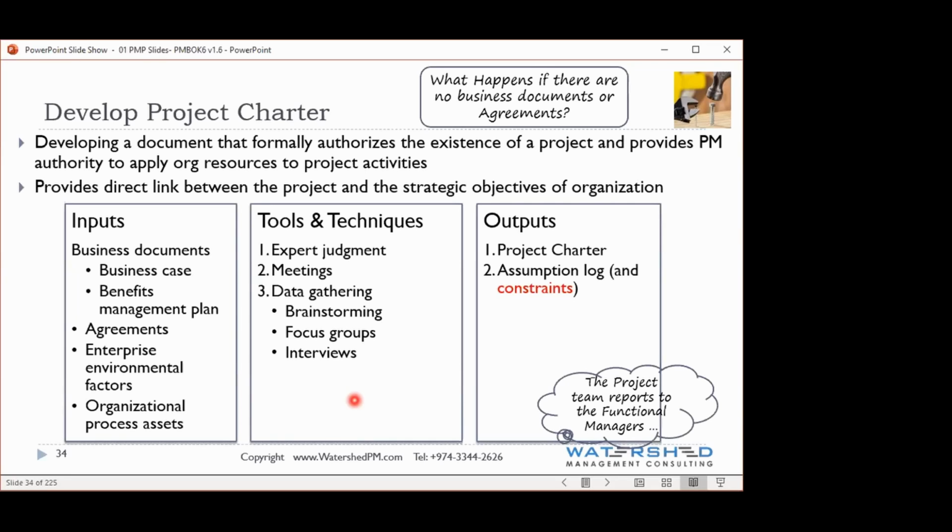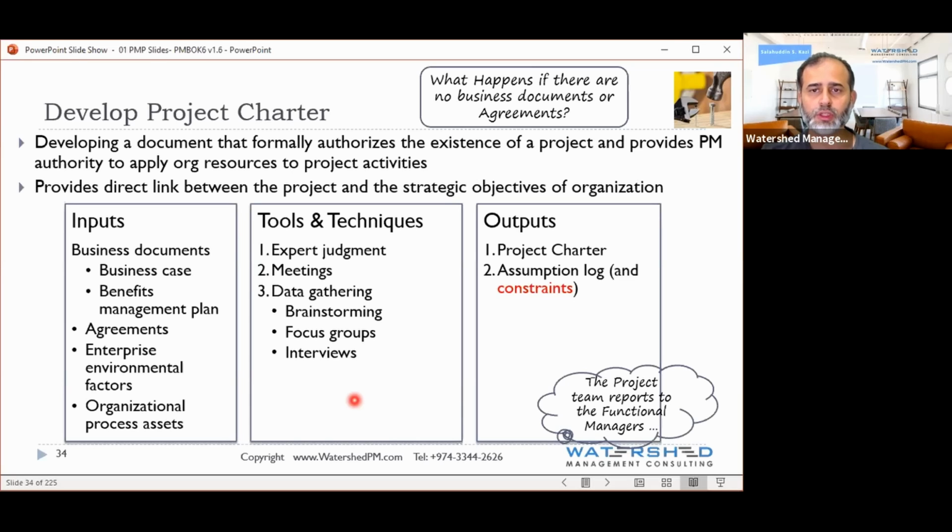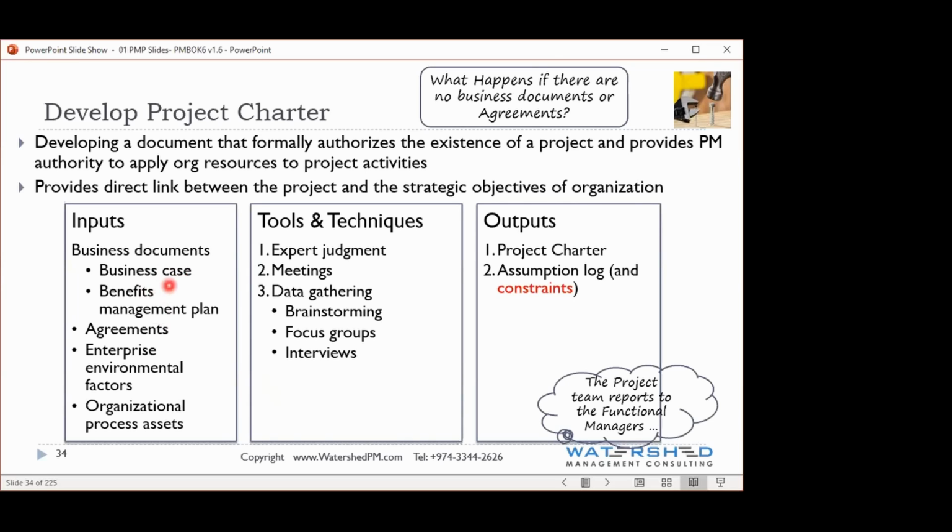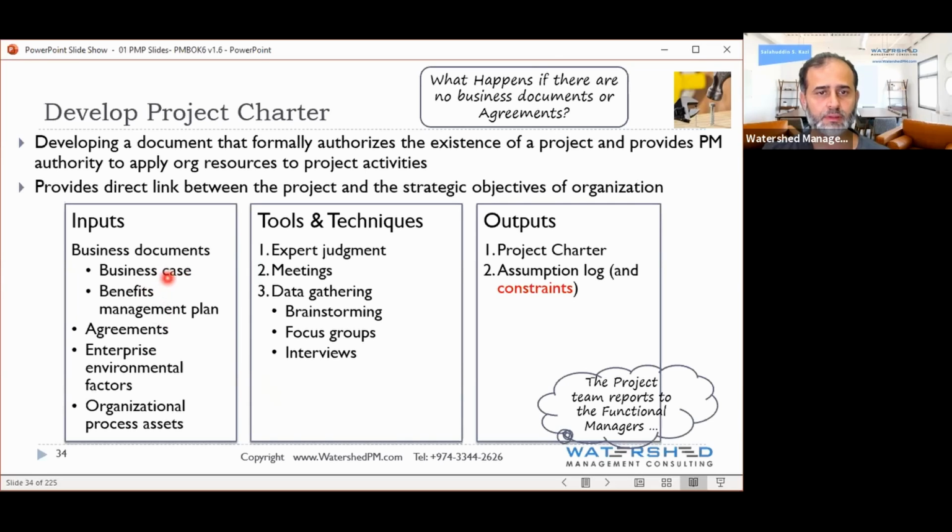Definitely, they need to go for approval before going for anything. Exactly. Now, how do they go for approval? They knock on somebody's door, or normally they do what is called a business case, or a benefit management plan, and show the company: if we do this project, these are the benefits, and this is the cost and this is the timeline, right? Yes. And then if the company management likes the idea shown in the business case, they will approve the project, correct? Yes.